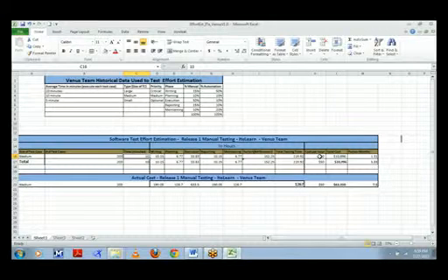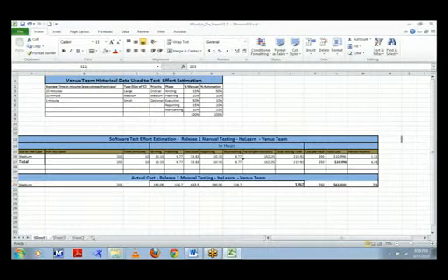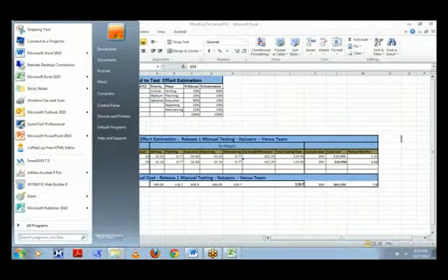The actual cost: again we had 203 medium-sized test cases, and our total number of hours was about 1,267, the total cost is about $63K, and person-months is 7.5.